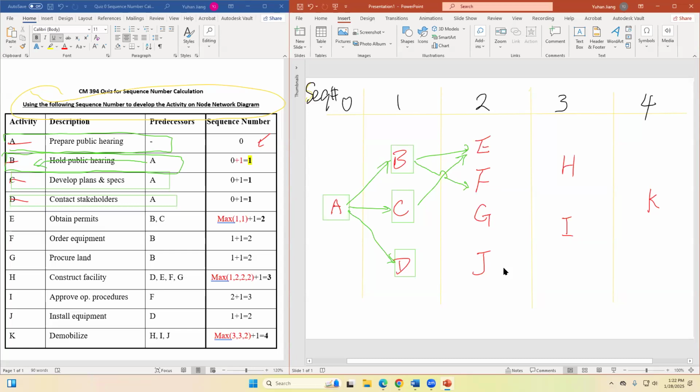When you have something very complicated and you cannot move the nodes, you can do it like this. But in our case, it's quite simple. What we can do is remove those. We change this one to F, and we change this one to E. Does that make sense? We can change it because they are still in the second column, right? So now we have the relation B to F, B to E, and C to E without creating any crossover. There's no crossover here, right?